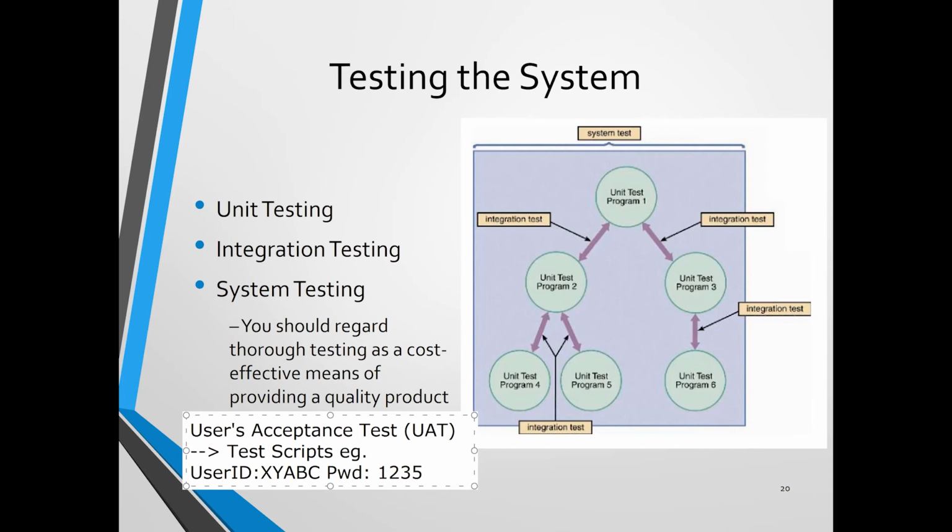What is the milestone for this UAT? Once the UAT has been signed off, normally we get the money. For example, once you sign the contract with the users, we may say that we will charge 30% as the first amount on the day of contract signing.